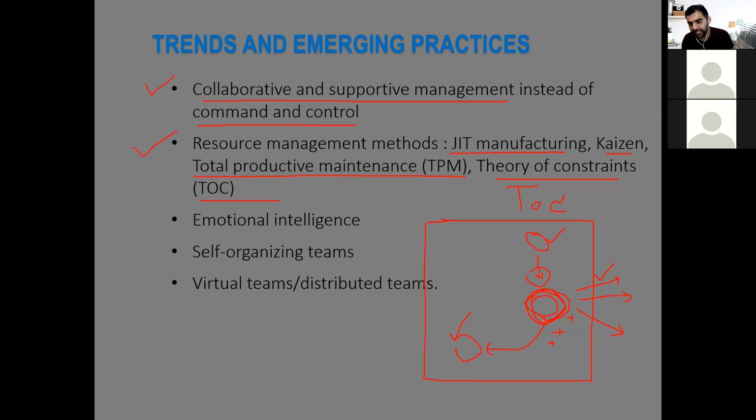Those resources could be team members, or multiple machines. Instead of two printing machines, we might put three, and so on. After providing extra resources to this component, we run the same thing again, but we don't put extra load as we already removed it, and then check again if the bottleneck is removed or not.